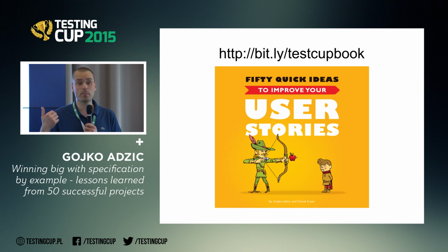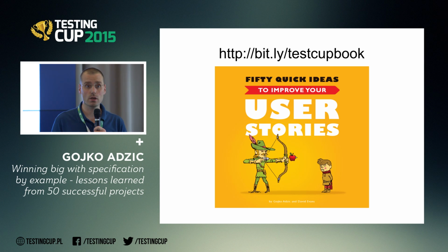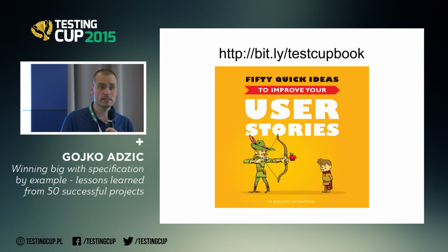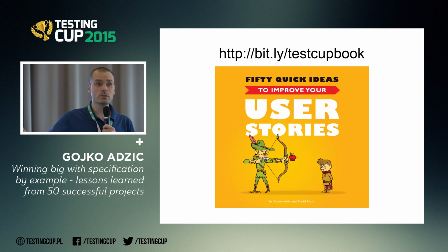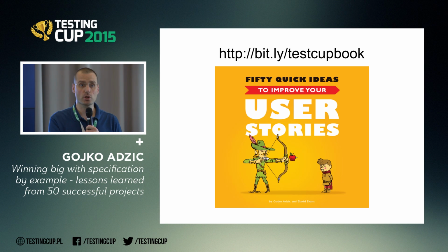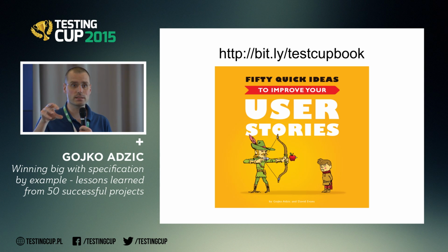But one example that I can give you is the Weyerhaeuser example. They started using the theory of constraints as their guideline. The theory of constraints says that in any process there's one part that's the slowest, and if you want to improve the process, everybody has to work on that part. So they tried to figure out, end to end, what part of the process was causing the most problems at the moment, and then developers, testers, analysts, everybody had to help improve that part.